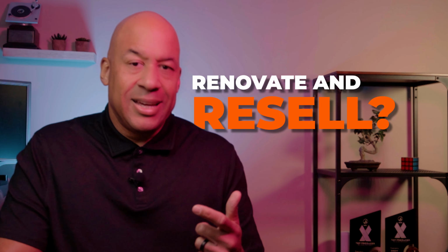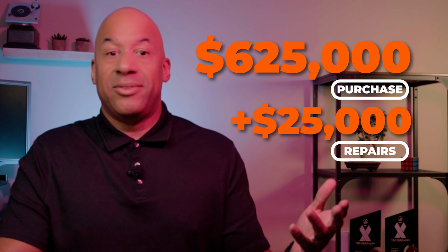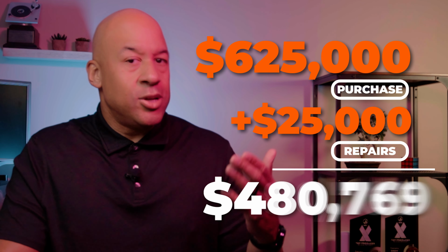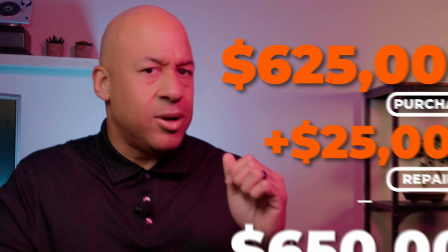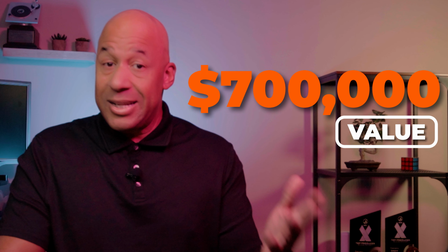What if we tried to renovate it and resell it? At a $625,000 asking price, plus $25K for updates, we're at $650K before we factor in the cost of money and any other holding costs. We likely have a $675,000 to $700,000 property, so that's not bad.